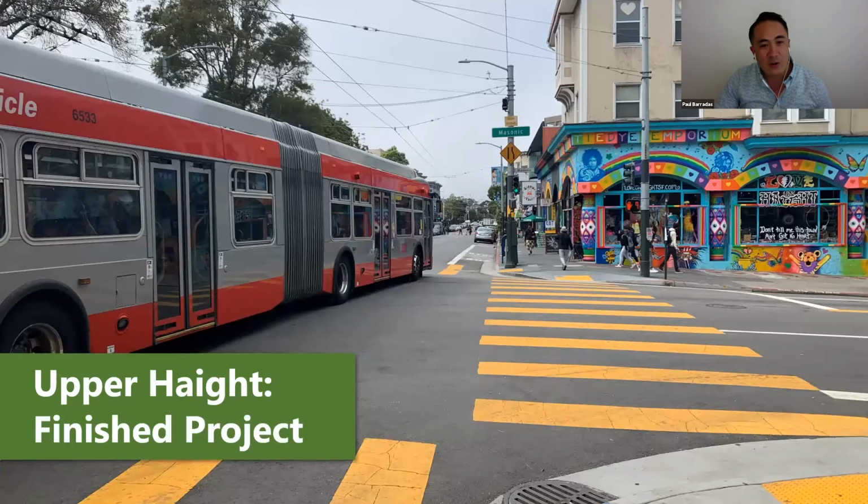The project had a goal to finish a quarter early. It was a 2-year-long project, and we tried to finish a quarter early. And with the assistance of partnering, we were able to achieve this goal. Additionally, there were no reportable injuries on the project.